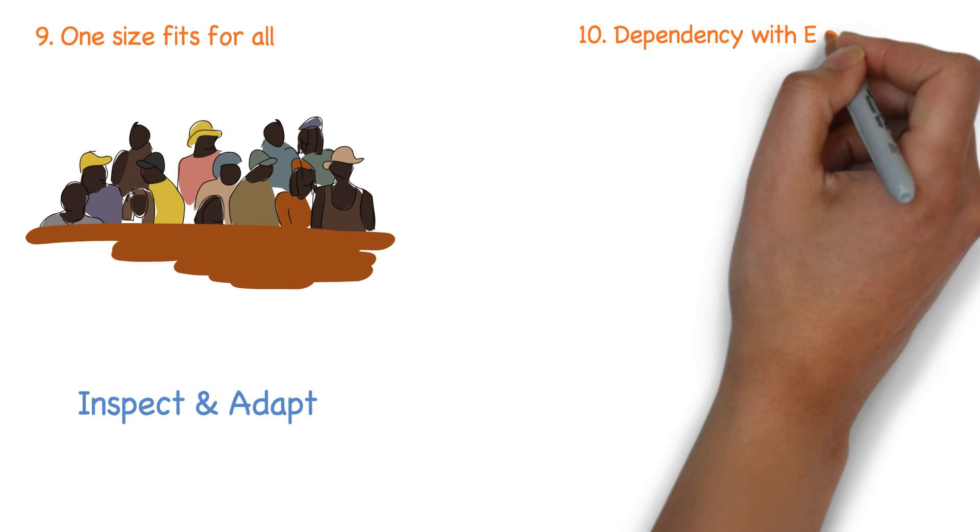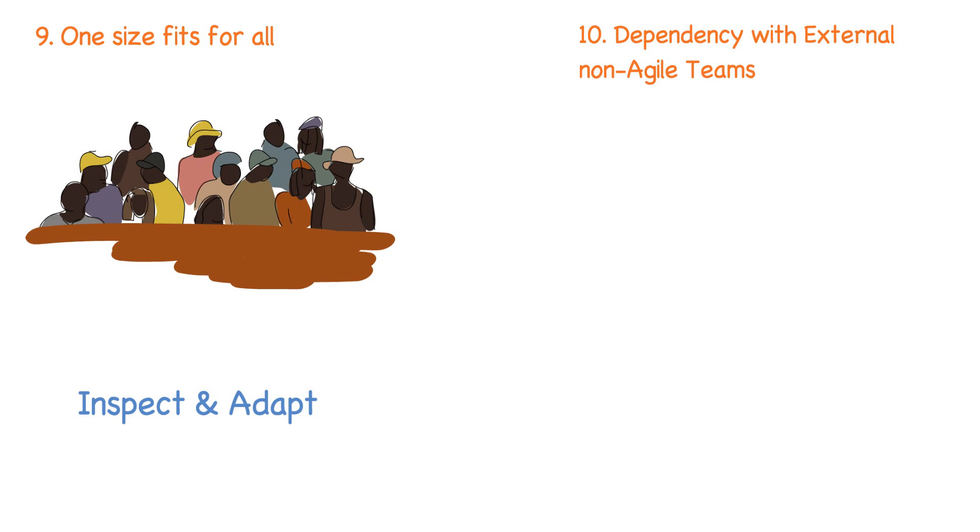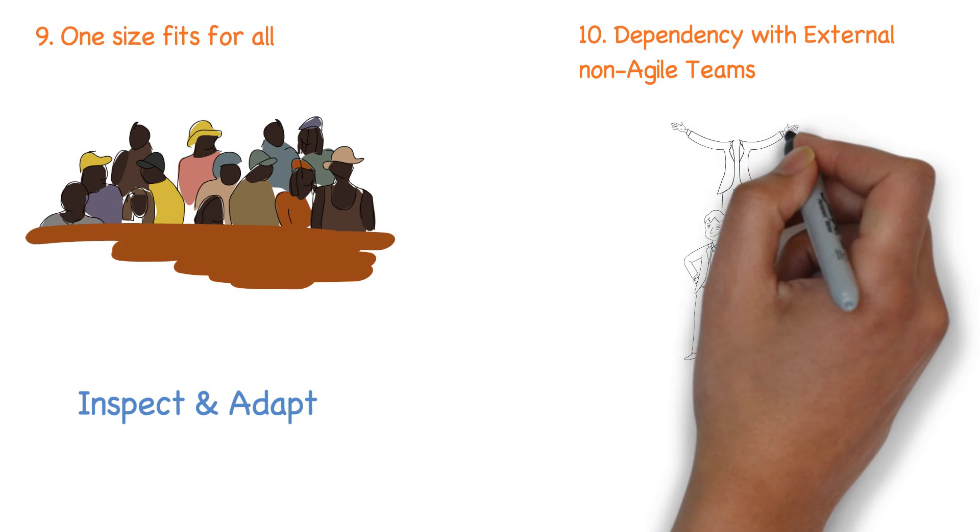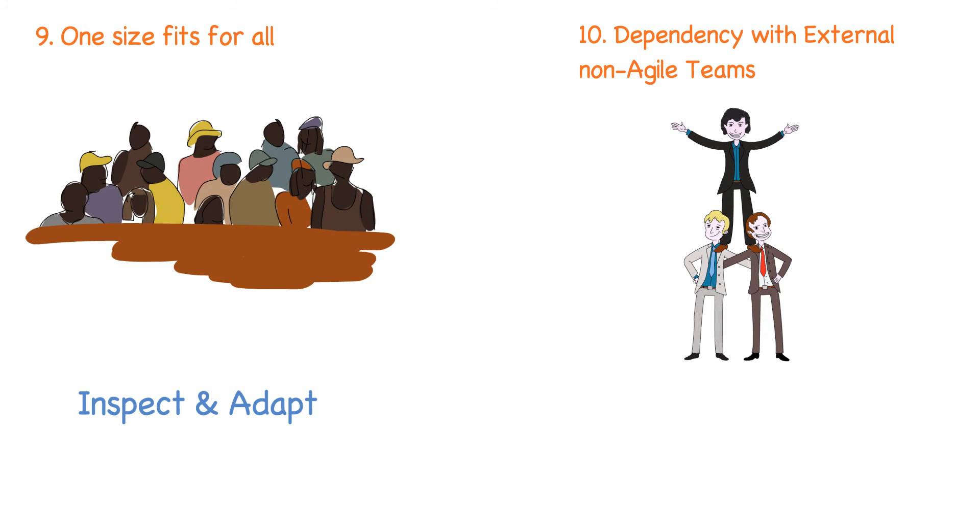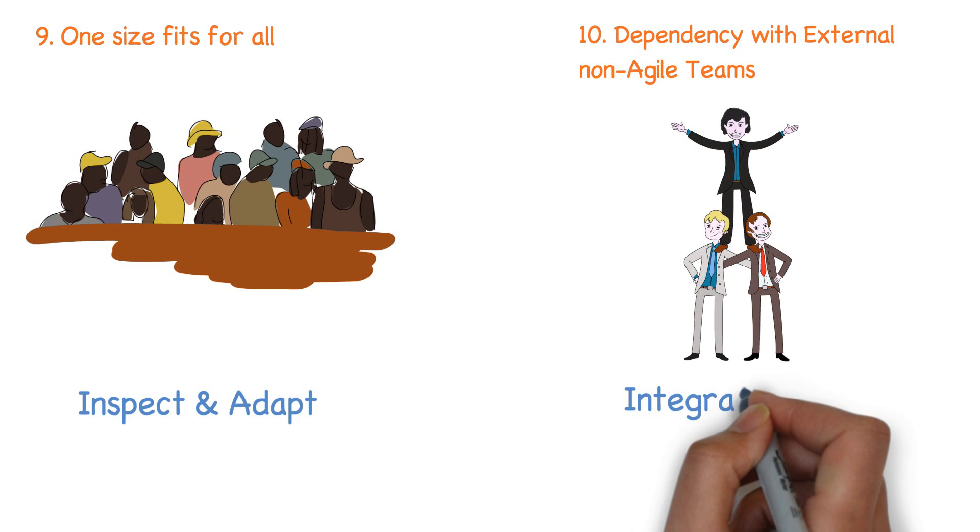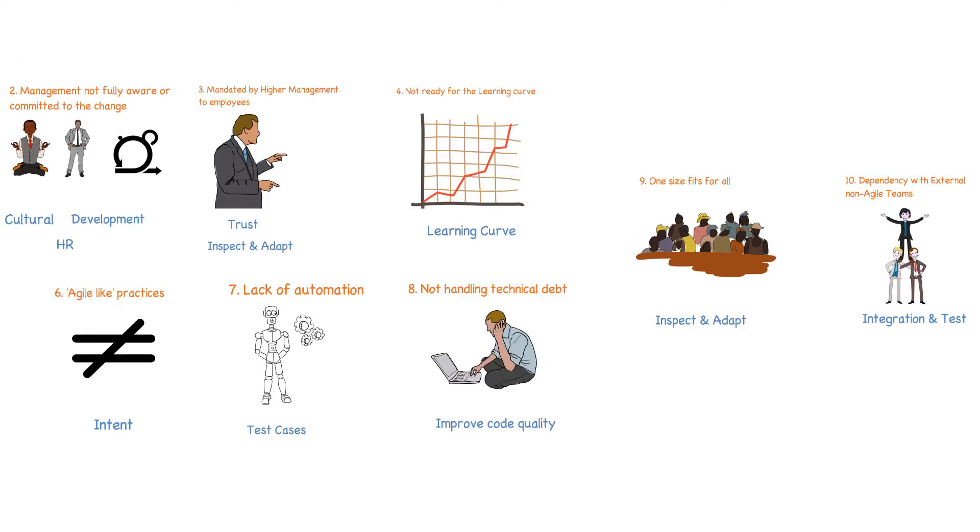Dependency with external non-Agile teams can be another cause for failures. If you have large dependencies with external teams who do not follow Agile, it will be an uphill task to expect intermediate good quality delivery from them for integration and test. This may eventually defeat the purpose of your sprint releases as you may not be able to validate in the product context.